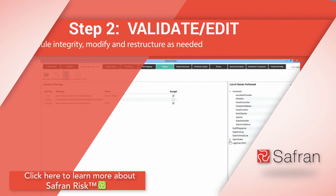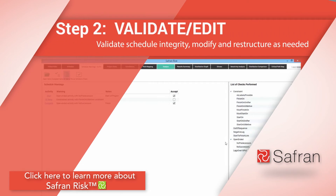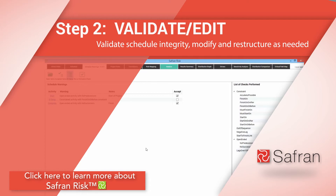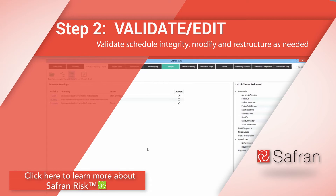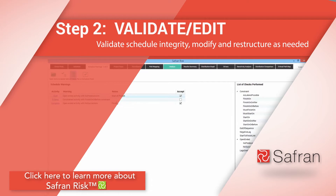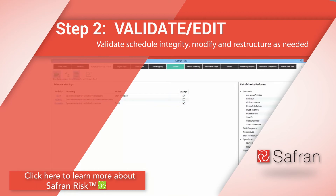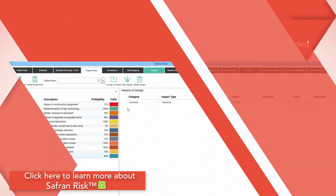The second step is to validate the schedule integrity, then modify and restructure it as required. Safran Risk quantifies both schedule and cost risk based on the impact type and distribution curves you require to realistically model each risk down to the activity level.